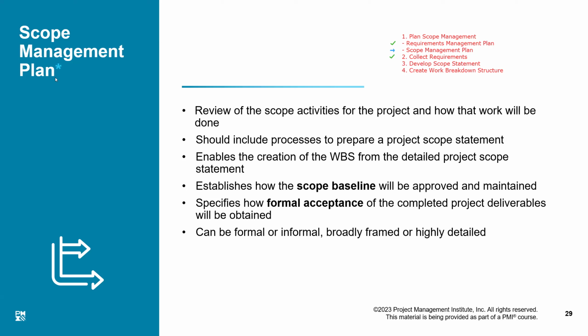What is the scope management plan? Scope management plan gives you the complete guideline. You create it as a project manager in a predictive project. It tells us how to establish a scope statement.